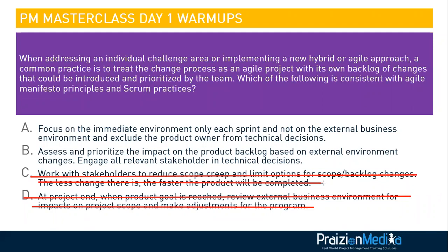All right. So when we say backlog, we mean product backlog, not the sprint backlog. The sprint backlog, we do not want to change as much as we can. The product backlog, people can update that. The question is, will it be done? And that's the product owner's call.